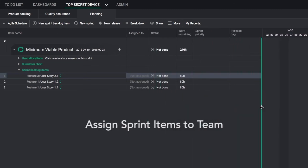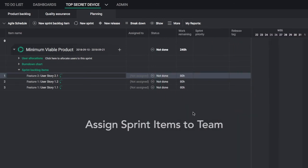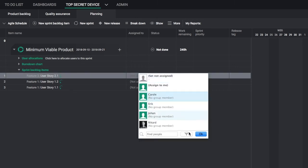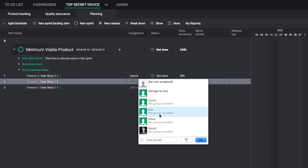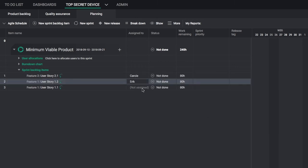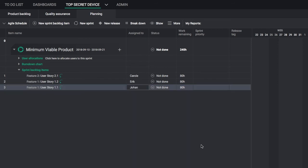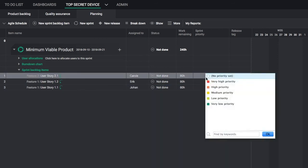In Planning view, double-click Assigned To to assign any item to a team member. You can also assign priority level by double-clicking on sprint priority.